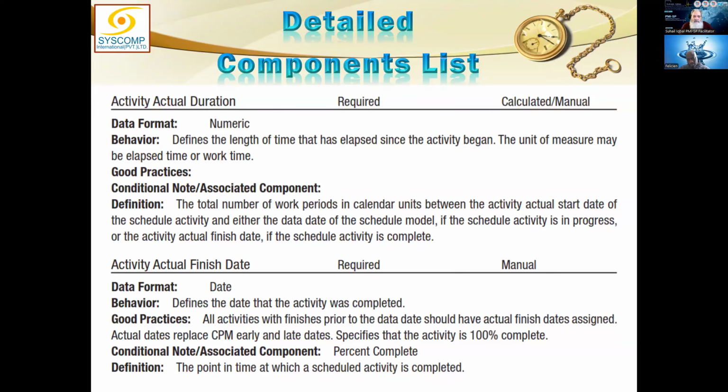So that means its activity actual duration is 3 to 13, 10 days. Maybe it did not finish on 13th but on 14th, then it will be 11 days. But when are we reporting? We are reporting on 15th of January, but we are not counting after this activity was completed. Got that? Yes, sir.